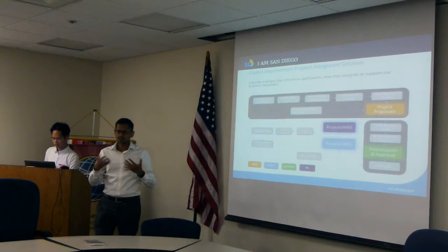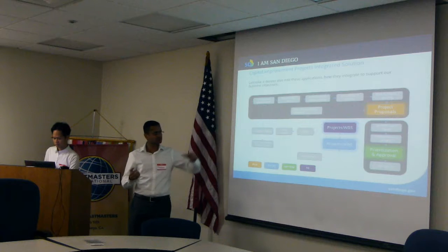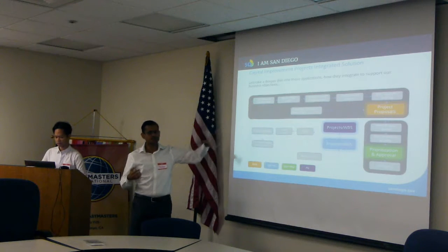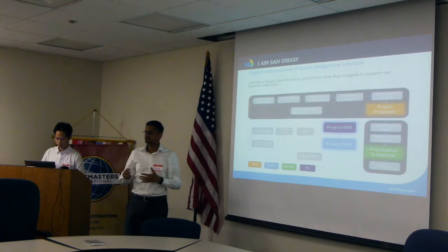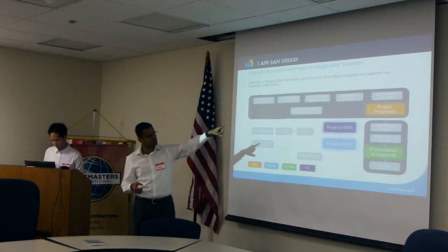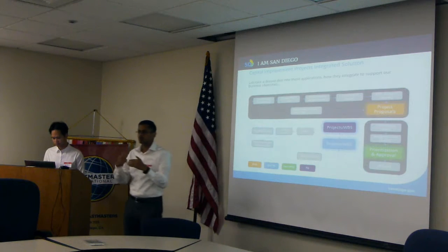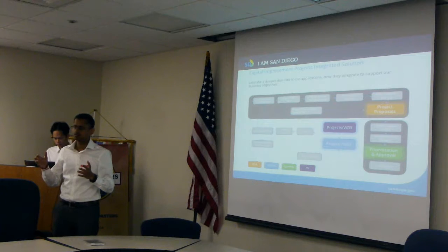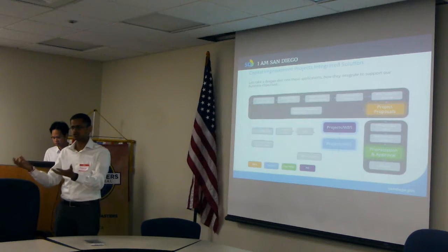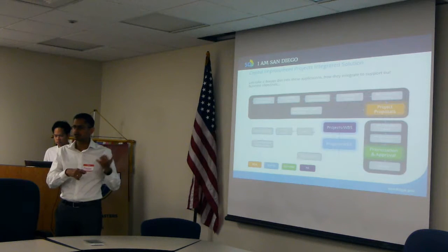Now, it's the city's team or the AMD, the people responsible, people working on Riva would then consider these and take these up as projects. Right? So once you take these up as projects, it goes into project portfolio management, where you determine where does this project lie, or which bucket, budget bucket, should the money be taken out of. Is it going to be from PUD?